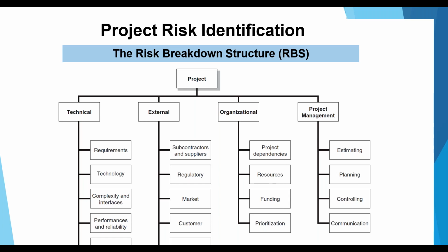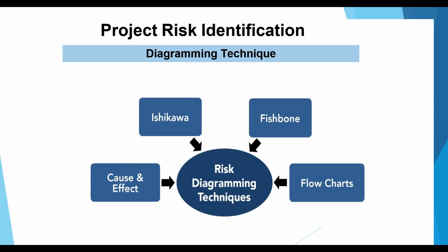These activities, or the work breakdown structure, can also give you some idea about the inherent risk in different types of activities. So you first understand the breakdown structure and then identify the risk inherent in those structures. This is one of the risk identification techniques used by construction engineers or managers in the project risk management process.